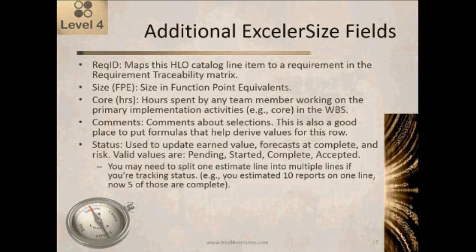Then core hours are the hours spent by any team member working on the primary implementation activities. In other words, the core activities in the work breakdown structure. So it's not limited to the programmers, for example. It wouldn't be accurate to say core hours are programming hours. That would be a simplification, and it's not exactly accurate. It would be more accurate to say that core hours are all of the people who are working on doing the development work.